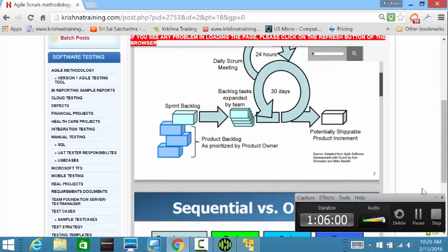And during the 8th month, we will be doing the user acceptance testing, where the team would be involved with the actual client in the pre-production environment, making sure that everything is working fine as per the requirements. When we go into the user acceptance testing, we already have done multiple demos within the team and with the client. So when we enter into the user acceptance testing, the risk involved is very, very less.